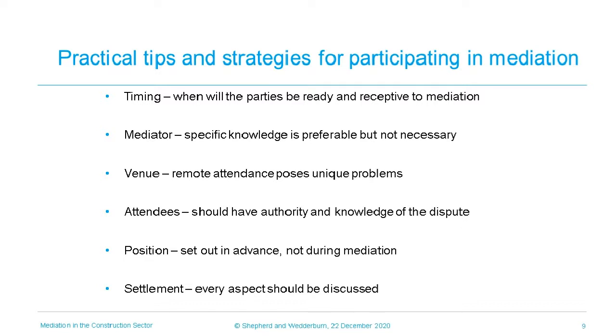Choosing the mediator is another important consideration. Parties shouldn't reject a mediator just because they are suggested by the other side. Bias is not as important a consideration as it is the parties themselves that choose the settlement. If one of the parties has had a positive experience with a mediator, this should be seen as a positive rather than a point of further dispute.